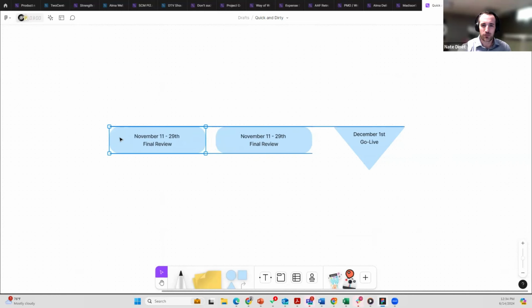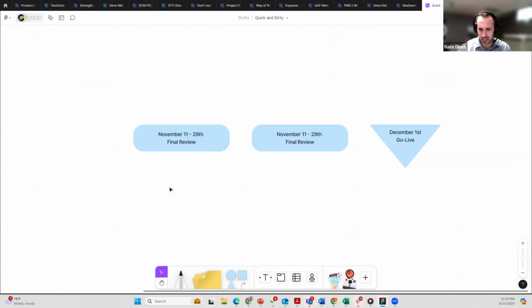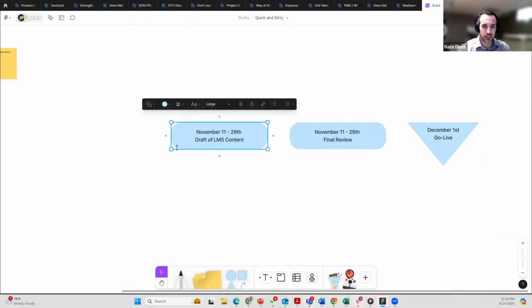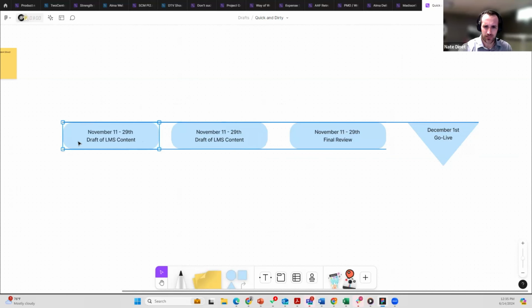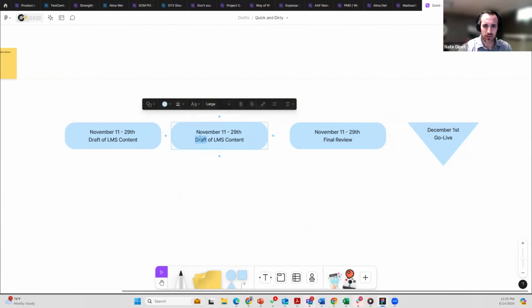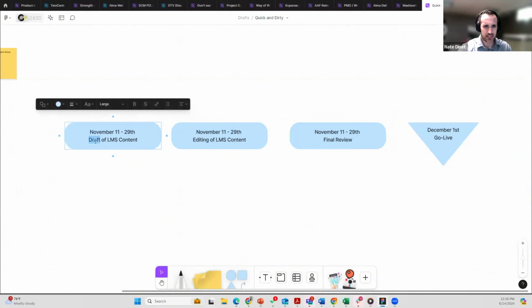Okay, so what happens before we do a final review for an LMS content shoot? Let's think about this logistically. I'm not really familiar with LMS, but this is a learning management system, is what that means. I would imagine creating the draft of the content is going to take a long time. Actually, now that I think about it, the draft of the content is only going to be possible after we shoot the content. So I'm going to revise this as editing of LMS content, and this is shooting of LMS content.